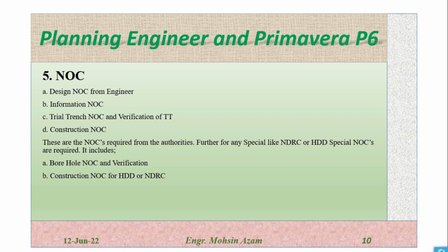Without NOC we cannot commence or start the work on the site. So first of all we will get the design NOC from the engineer. This is actually the approval of the design by the authority. Once the design is approved, the authority will issue an NOC to the engineer, and this NOC should be handed over to the contractor at the time of award. Information NOC.